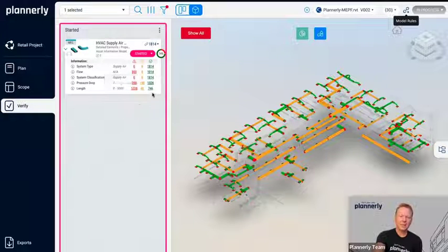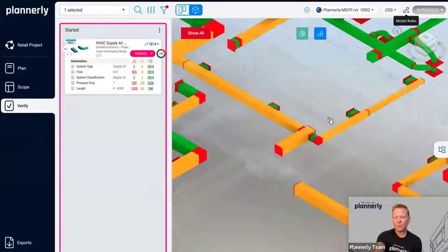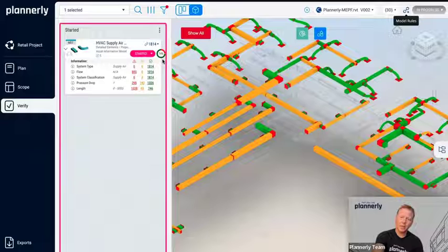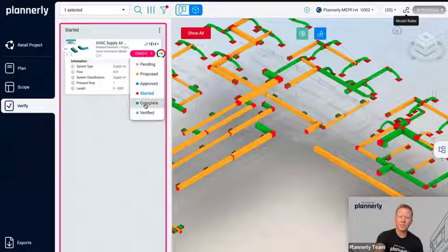So easily checking this to see which ones are missing the requirement, which ones have the requirement but they are incomplete or the value doesn't meet the rule, and then which ones are complete and correct. And by seeing that, we're able to review the model before, and this is a QA step that would happen before it's approved and paid for. And the principle is that this is part of the workflow for the people that are modeling, and it would only be when this is 100% that the task status would be set to complete, and the manager who is reviewing it would then be the only one that would be able to verify.